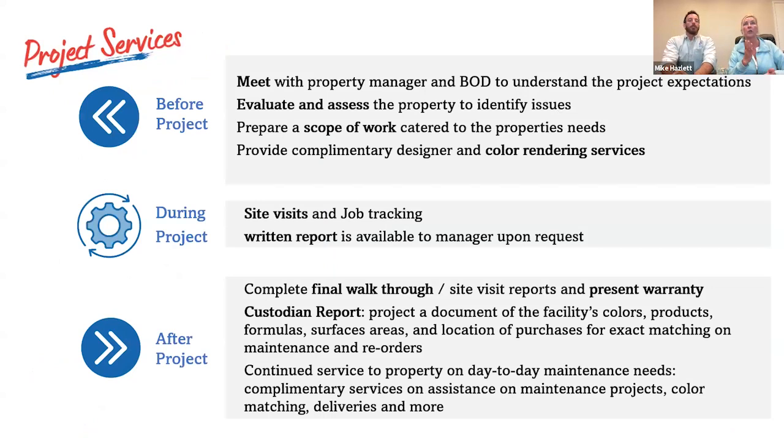Yeah, so your specification will include everything that's on your property. If you have parapet walls, unit entry doors, garage doors, every specific surface is detailed in there, with what the prep should be for it and what the proper product is for it.